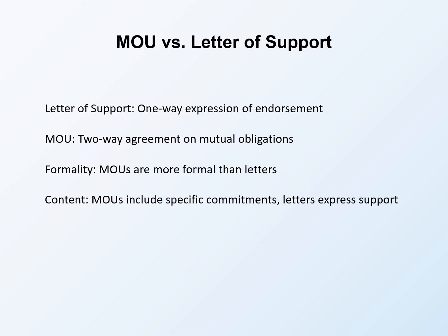Roles and responsibilities sections in MOUs must be specific enough to create clear expectations while remaining practical to fulfill. For your organization's responsibilities, describe exactly what you will do under this partnership. What services will you provide? What resources will you contribute? What activities will you lead? Specificity creates accountability. If you commit to providing 20 hours of training, you can verify whether you delivered. If you commit to providing training support, ambiguity invites dispute.